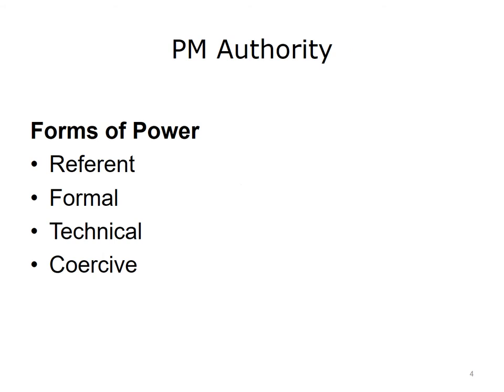When managing a project team, it is important to understand the different types of authority that exist. Team dynamics will be greatly impacted by how power is asserted. Referent power is individual power based on a high level of identification with, admiration of, or respect for the power holder. Formal power is based on rank or position — where the project manager has been assigned by senior management to be in charge. Technical power is based on strong technical skills in the project's domain. Coercive power is authority dependent on fear, suppression of free will, and/or use of punishments or threats.